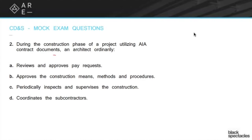You don't do pay request reviews on every single project, but on most projects it's one of your roles as the owner's agent — helping the owner understand whether what the contractor is claiming is reasonable. For example, if the contractor says they're 100% done with plumbing but none of the toilets are installed and none of the sinks work, you get to say no. That's one of your key roles during construction administration. All the other answer choices are essentially versions of means and methods, which is all the contractor.